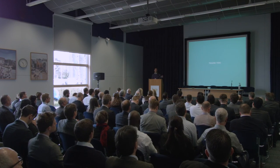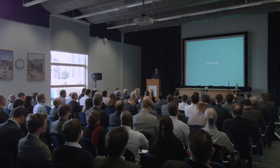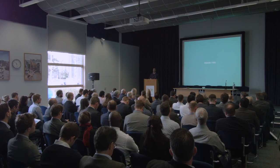Now, where we are now is that we're just about to get our final BIM execution plans from our contractors, and we're also working with Thames Water and our contractors now to look at our maintenance requirements around the asset cycle. So although it's 7 years in the future, we're having to start to plan now with our contractors to ensure what we do throughout the design and construction and then finally the operational and as-built is in alignment as such.